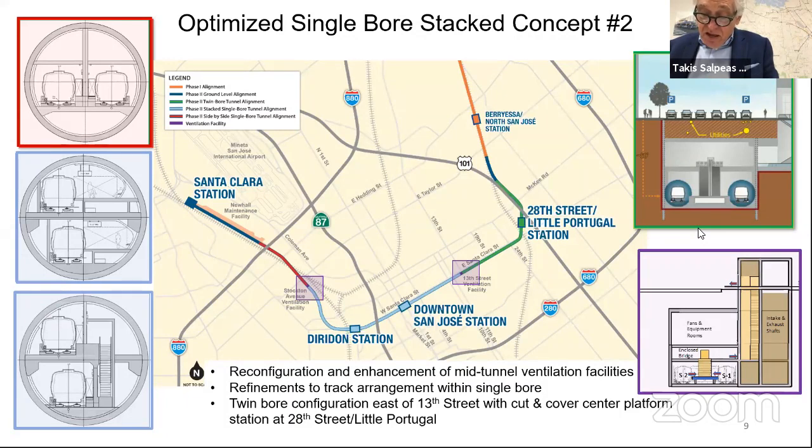There is not every day which we do 48-footer TBMs, but practically every day, especially in LA now, they do those twin bores. And because of seismic considerations, believe it or not, the diameter on the twin bores in LA is equal to the diameter of what we're gonna need here for BART. And as you know, BART's a wide gauge as compared to a standard subway LA is. For that, we do have some good data here, and we're gonna collect more, and hopefully we're gonna have the right comparison and the right answer for all the elected officials to be able to respond.